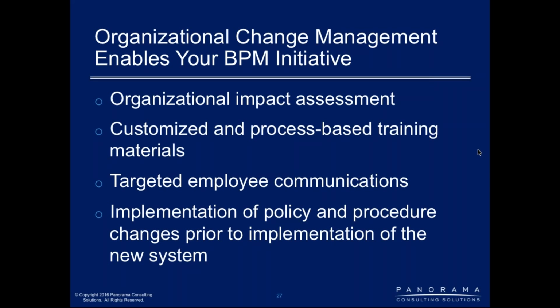But a lot of times that gives you some immediate lift because it gives you the benefit of the process change, but it also spoon feeds the changes to the employees so that they're not stuck with a bunch of changes all at once on day one of go live. Instead, you've slowly phased in some of these changes over time, rather than waiting until you pick a technology, then you implement it, then you're forcing thousands of changes on employees across the company all at once, which is usually messy. So there's a lot of benefit and merit to that last bullet, which is focused